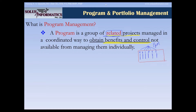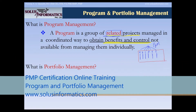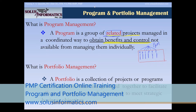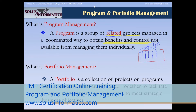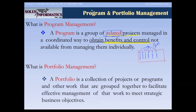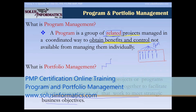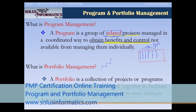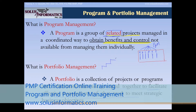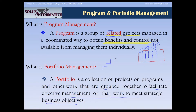If you remove the word 'related,' it becomes a portfolio, because a portfolio is a collection of projects and programs that are not necessarily related but are grouped together to facilitate effective management of that work to meet strategic business objectives. On the lowest level you have a project expeditor, then a project coordinator, then the project manager, then the program manager, and on top of that you would have a portfolio manager.